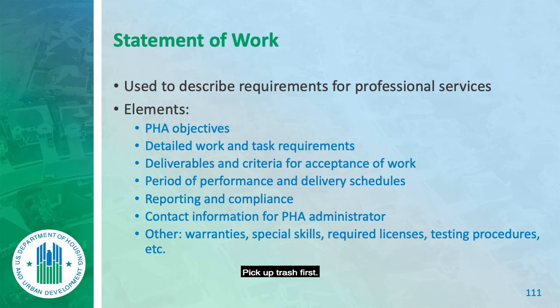Pick up trash first. Now, why do I cut, edge, and trim? And by the way, I had a lawn maintenance company for 20 years. While I was working at the government, my dad ran it for me during the day. I had 15 employees. Because if you cut first and then you trim and leave that laying there, it looks bad, right? Also, we would edge and trim so that when we went along, we would suck up with the mower all of the stuff off the walks. The next thing you do is blow the walks, clean the parking lot, check sprinklers last.